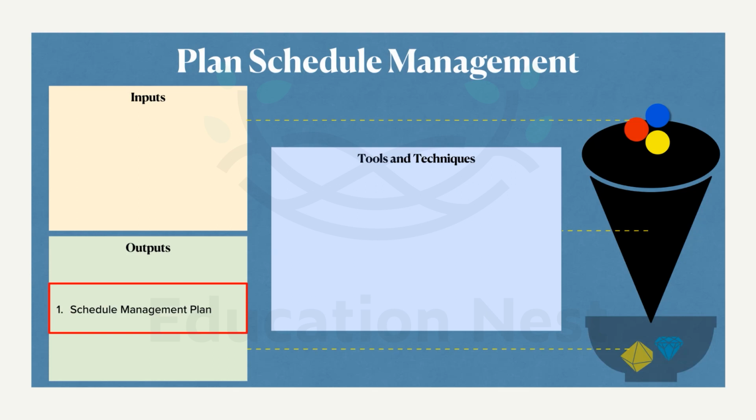So what does this particular output establish? We will have the project schedule model, that is the critical path method or agile method. When I say we, I consider that we are the project managers. So the project managers can decide whether the scheduling model will be the critical path method or agile method. Why did I say or? Critical path method is usually a traditional method or a waterfall methodology. And for agile methods, we learned about the rolling wave iterative method and the Kanban method.